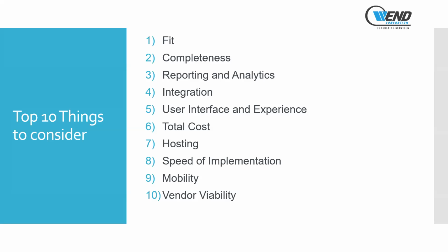If we're purchasing an ERP directly from a vendor, we want to make sure that that vendor has the ability to get that implemented, or has partnered with people to get that implementation done in a cost-effective and timely manner. Always set your go-live date and then start working your way back from there to make sure that we have the ability to make it inside of that time for that speed of implementation.